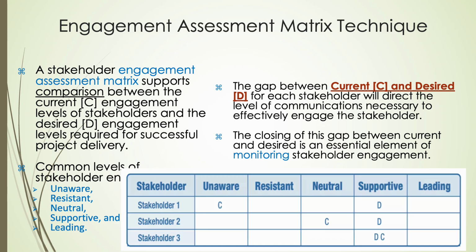Effective stakeholder management is critical for project success, particularly when integrating corporate social responsibility (CSR) principles. Utilizing a power interest grid, stakeholders are classified into groups for tailored engagement. High-power low-interest groups like management and investors are kept satisfied, while high-power high-interest groups such as end users require close management. Operations teams and SMEs who have lower power but higher interest are kept informed, and developers who have lower power and interest, monitored with minimal effort.